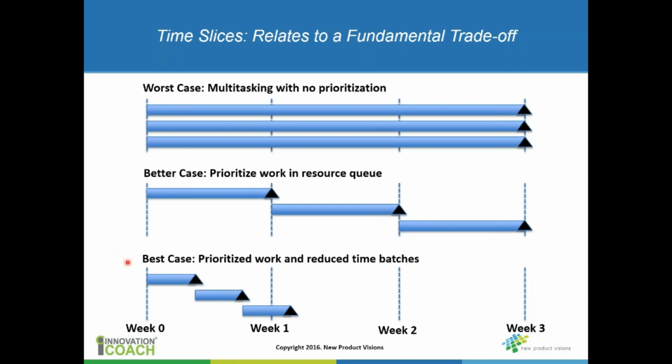But there is another way, kind of a best case, where the content provider here, the person that's working on these 3 tasks, is working with the project manager on these 3 different tasks, and they come up with a way to synchronize the work, reduce the time batches of the tasks that have to be done, break it up into some logical chunks, and do it purposefully so that you're not just multitasking, but you're breaking things up into chunks where you can spend a couple days on this task and then hand that off to somebody else and then go on to this task.